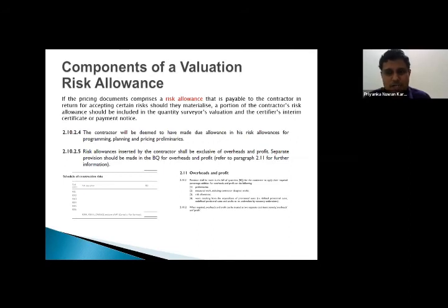That you have to understand. The scenario and the mechanism pertaining to overhead and profit is different. How do you assess the overheads? Normally, whenever there is a company running 10 projects, whatever the non-direct costs, overhead, which is in the head office, the accountants and all the other supporting staff, what they normally do is apportion the overhead into the projects that they are going to get.